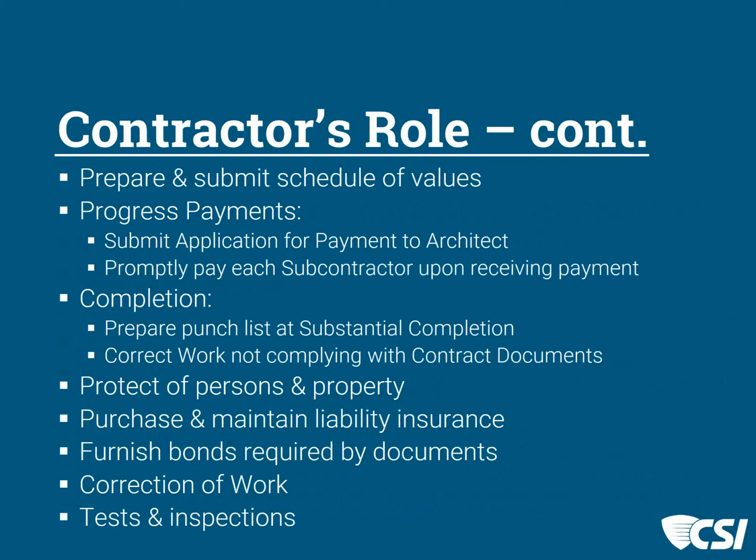So submitting those schedules and making payments as you're supposed to, and completing the job when you're finished, so that we do our 2 inspections in the end of the project where it's substantially complete and finally complete. And paying for everything and turning that over lock, stock, and barrel with no liabilities or encumbrances to the owner, with all the tests and inspections from the authorities having jurisdiction in place and completed. That's all the contractor has to do.